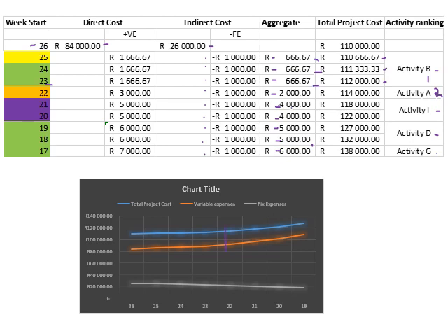So I could see on the graph there was a bit of a jump in this section. So my interpretation was that the optimum time before that jump was 23 weeks. So that's the optimum time for the project if you do not want a significant jump in the project.